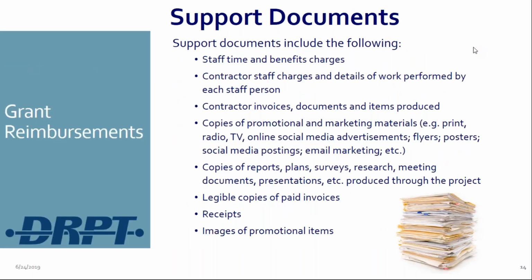All right, so just some examples of supporting documents. If you're charging staff time, you're calculating this probably from some payroll system. We want to see either a print out of the payroll system showing the staff charges, including benefits, or however you do that. We want to see some documentation towards that, rather than just putting a number on that summary sheet. There's got to be something to support how you came up with that charge.